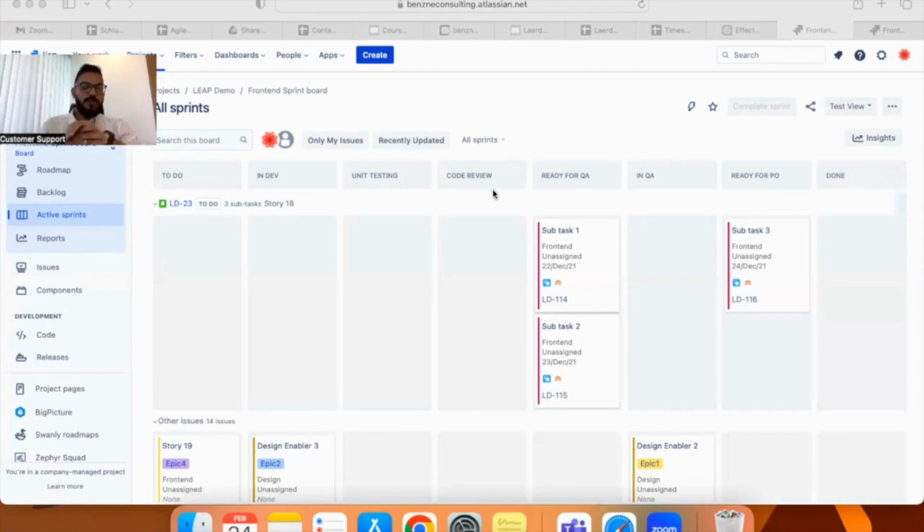So these are a few tips with which you can do an effective daily stand-up meeting in Jira. One way is to go person by person using quick filters in active sprint mode. The second one is going story by story to understand the progress we made. And the first primary step before we start the daily stand-up is to visualize the Burndown chart in the report section to understand how much work is remaining for us in the sprint. So these are a few tips I wanted to share with all of you in this video.